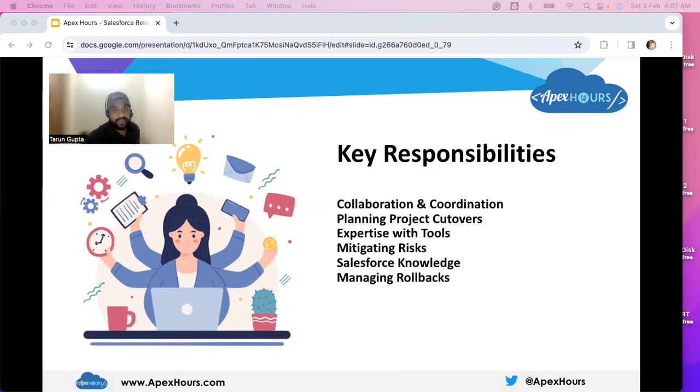And Salesforce knowledge: manage work in the sandbox, deploy and manage the components, and handle release branching as well. You should be aware of the branching strategy. Managing rollback means handling each rollback, identifying and fixing issues, ensuring the release stays on schedule. Also coordinate the Scrum, UAT, third party team and joint teams, document outstanding known errors, handle the release documentation, communication and training, implement a source control system, provide a release roadmap, conduct the service rollout planning, manage reports on the release process and service level agreements, and ensure release acceptance, including the business sign-off of UAT.